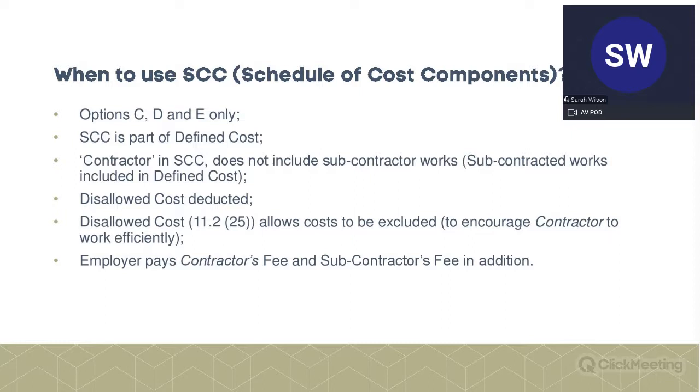So it's quite a neat way of doing it, as opposed to, of course, with JCT, where it's either set out in the contract, but as far as variation work is concerned, for example, you end up having to claim rates based on either analogous rates within the contract or reasonable rates, and then you have to show that your overhead and profit is a reasonable sum.